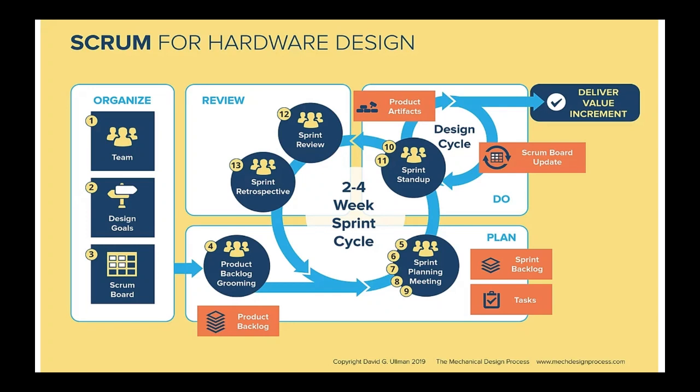And you come up with, as you move into steps 5 through 8, that's your sprint planning meeting, your stakeholder meeting. And you start working through those tasks. This cycle, as you can see in the center, they suggest anywhere from 2 to 4 weeks. I really like a 2-week cycle. 1 week doesn't seem long enough to get a sense of how well this step is going. 2 weeks seems about right. So when you're looking at this semester, to come up with 4 or even 5 sprints, 8 to 10 weeks, 2 weeks each, it gives urgency and organization to your capstone.